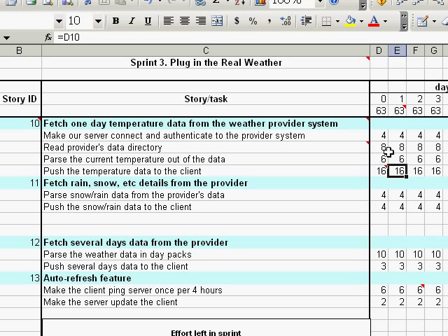During the sprint, the team updates the estimations every day. A good moment for it is a daily stand-up. However, there is no strict rule about it. There are teams who like updating the sprint backlog every morning or every afternoon, or just whenever they feel there is something to update.